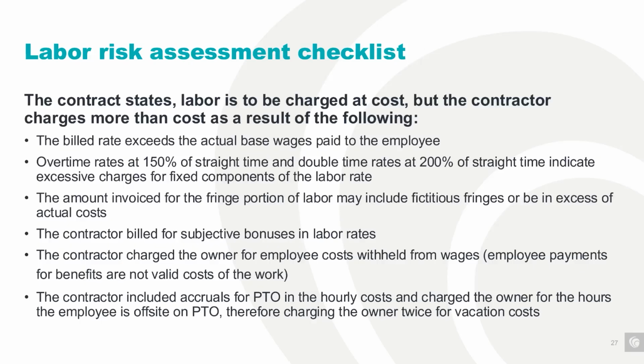A common issue we actually see is double charging for PTO. We saw this recently on a university renovation project that we're auditing. PTO was already built into the hourly labor rate, but then the contractor also billed separately for the hours the employee was off-site and on paid time off. So this resulted in the university paying twice for the same benefit.